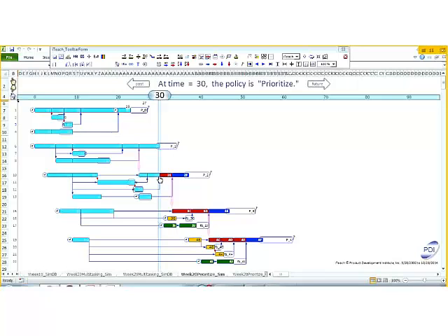Project 3, we've got a little bit of a buffer incursion. But the drum resource is now available to work on the remaining work, and then we'll use the system engineer, and it's expected to finish on time. There's no multitasking, so it's going to proceed the week of 5 days per week. The only possibility is we could have a bit of a handoff delay.